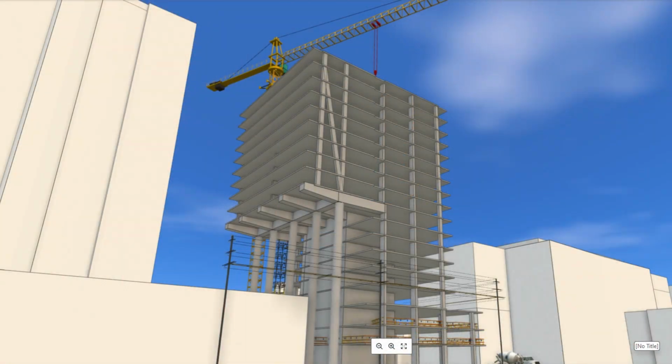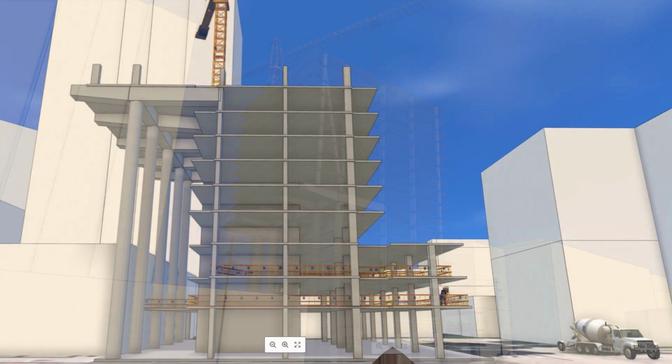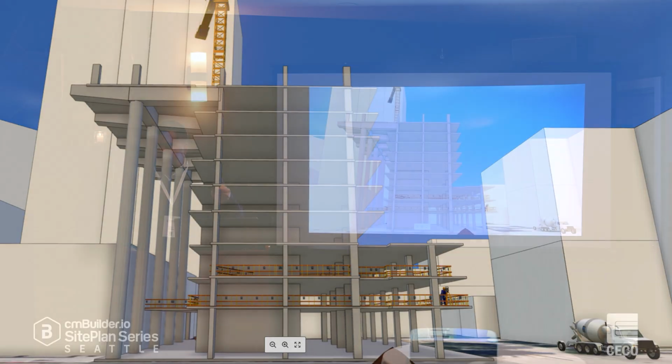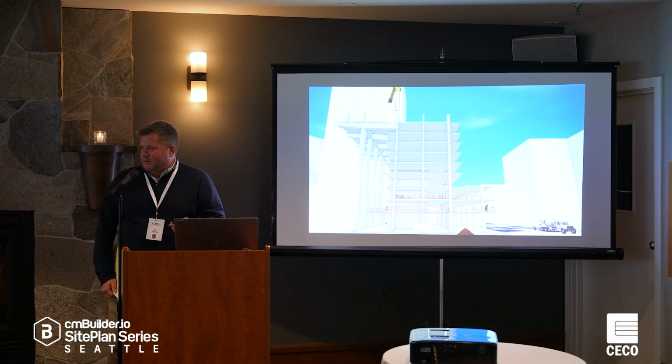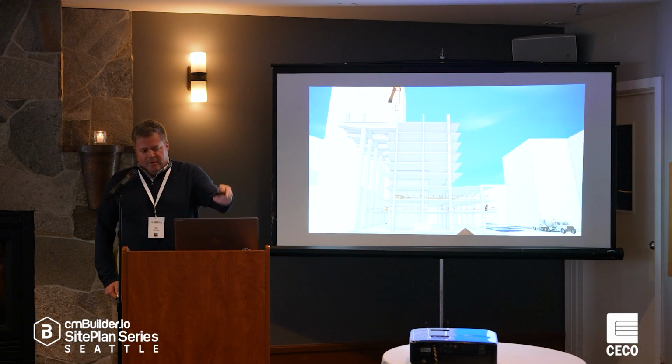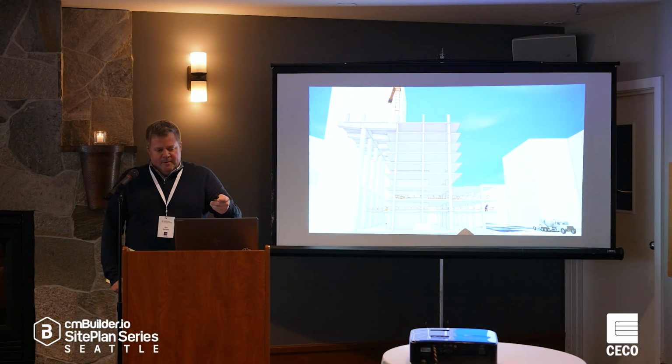Here's another example. I'm not sure if we're going to build this or not yet. We're waiting to see if it goes, but these two slides are how we're modeling it. It's 100 feet up in the air. It hangs over an existing building, and we're trying to deal with the neighbor that maybe likes our customer or maybe doesn't. If you can go down and set stuff on top of their building to build this, it's not too bad from a cost point of view. If you can't, very, very expensive.